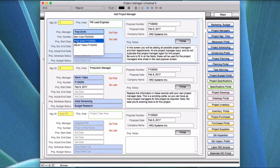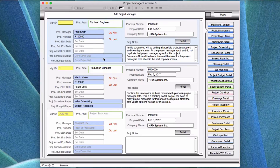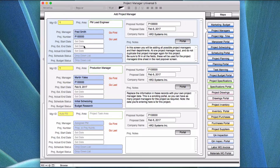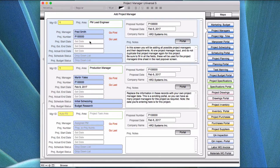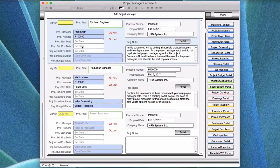When you add a person in, you have choices of all the employees you've added, and you're tying the actual project to the people in that project. For example, we have Martin Yates and Fred Smith, but Ben Cole is actually on another project — if he were going to be part of this project, you'd create a record for him showing what he's covering. You're putting in start dates and end dates, and this is critical — don't leave any fields blank, because you're allocating time and expenses for this project manager. The actual end date matters because sometimes a task ends up shorter or longer than scheduled.